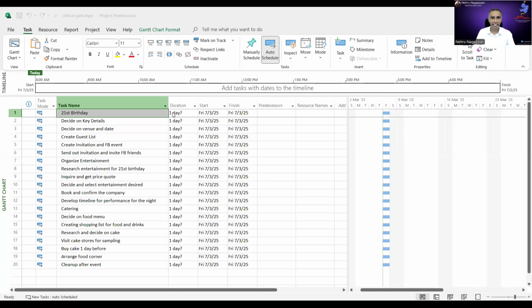All right, we are here in Microsoft Project. I'm just going to give you some simple basic scheduling techniques at a high level. So usually what we do, as I mentioned earlier, is create a work breakdown structure. You'll have WBS level 1, which is the project level, and then WBS level 2, which is basically your deliverable or the phase of the project. And then WBS level 3 will be your activity, right? And if the project is large, then we might have level 4, level 5, all depending on the duration itself.